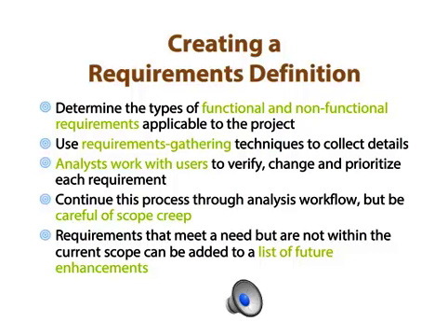You know, it's a big danger. If we uncover something now that is essential that was missed in the vision plan or the inception plan that we created earlier, then we add it. Otherwise, we put it on the pile for future enhancements.